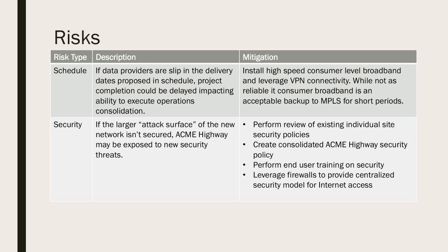Okay. Have we looked into possibly contractual clauses that we might be able to establish penalty clauses, for example, if our providers don't meet their dates, and therefore if we miss an engineering date on one of these projects, that could completely eclipse the cost of this project. So is there some way that we can mitigate that financial risk with contract clauses?